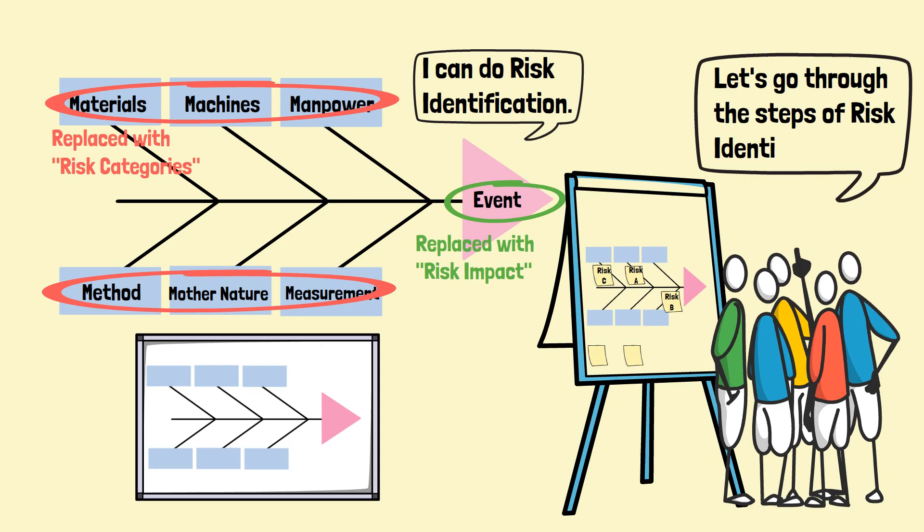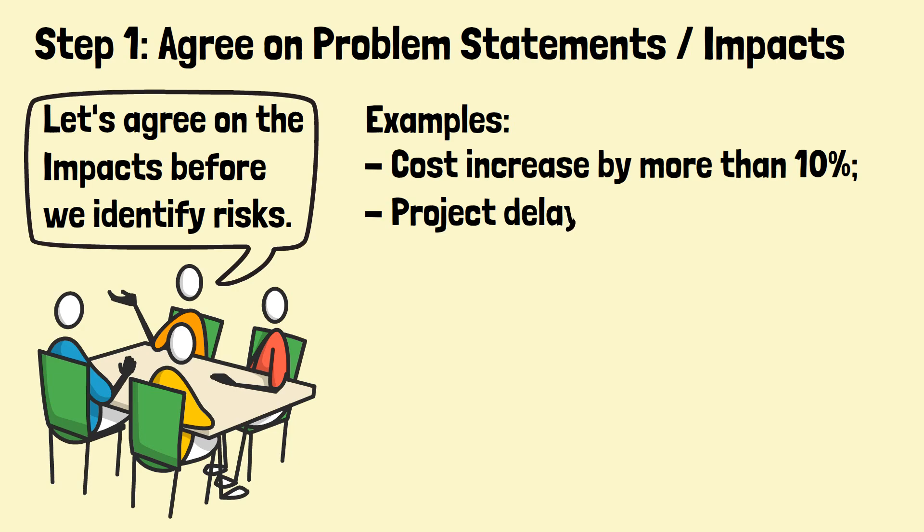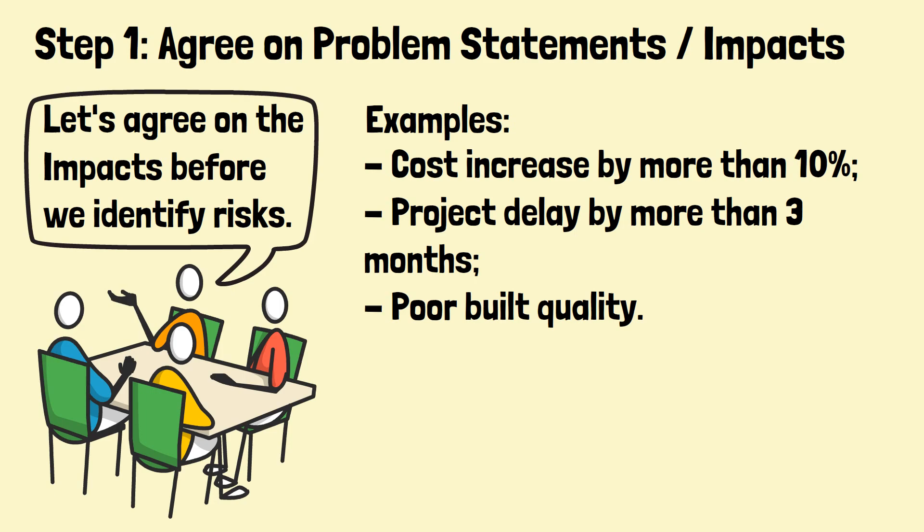Let's discuss the steps of risk identification. Step 1: Agree on the problem statements or impacts. The participants shall first identify the impacts of the project. Examples are cost increase by more than 10%, project delay by more than 3 months, and poor built quality. Each impact will then be written on a fishbone diagram.